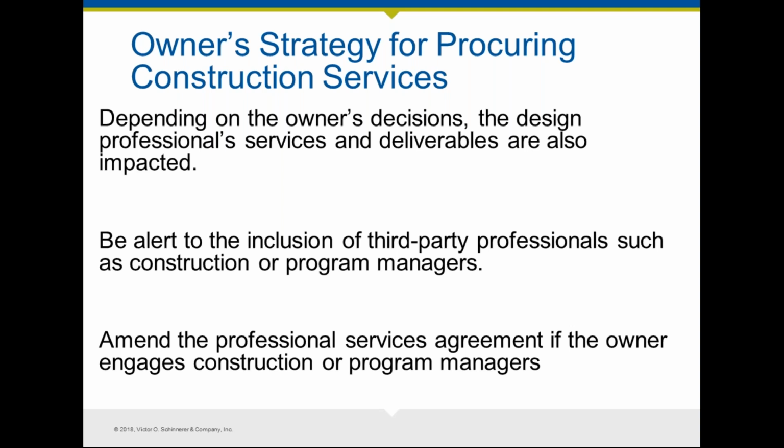And what does that mean in reality? The reality is that you have to go ahead and amend the professional service agreement if they're engaging construction or program managers, because it does impact who you're dealing with. You need to know what the construction manager's authority level is, what they're actually doing, and so on.